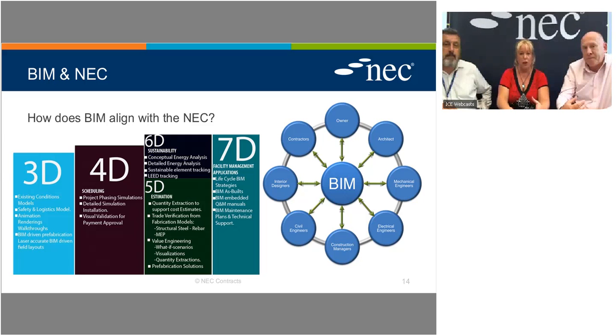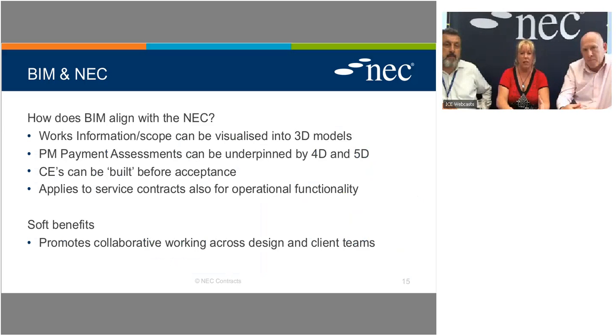Yeah. As I've already said, how BIM aligns with the NEC. It gives a very visual output, allowing certainly the client team, which I've sat alongside major contractors, civil engineering contractors, helping client teams visualise things like the works information and scope. These are people on the client side who aren't trained to interpret and understand architectural drawings, so for them it's particularly valuable. PM assessments, I've already said, can be underpinned by the 4D and 5D, allowing the project manager, if you like, confidence that there's integrity in the contractor's information coming through, and is completely comfortable to make that payment. And compensation events, which can be built before acceptance.